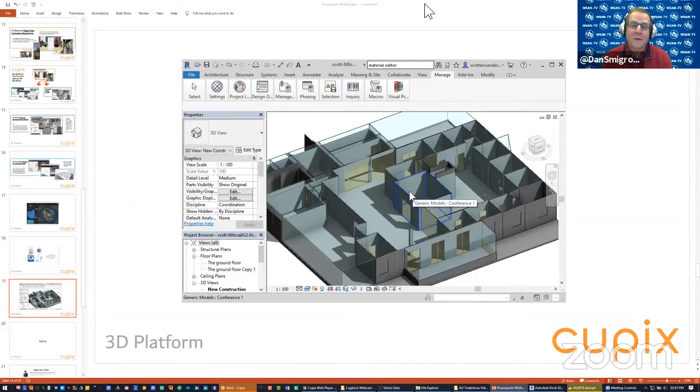So again, for a service provider, be careful not to get caught up in this whole accuracy question, because for two out of the three pieces, it's totally fine. And it's not going to matter whether you're using Matterport. For that matter, even with some LiDAR scanners, it's not going to matter as well. The trades are going to want to come out and do their own measurement, because if it doesn't fit, they're the ones who have to eat the expense. So they're going to do their own measurements.